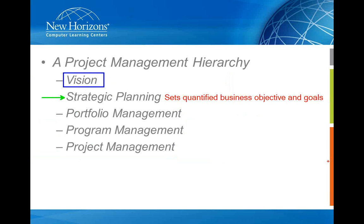If all I ask is what's the best technology, then I'm going to end up spending more money than necessary on technology that we're barely going to use because we're only going to scratch the surface of it. The correct question from a business perspective will always tie it back to the output of strategic planning, to these objectives and goals. The question is not what's the best technology that's out there. It's what technology out there is the best fit to my company's needs, including their financial ones.